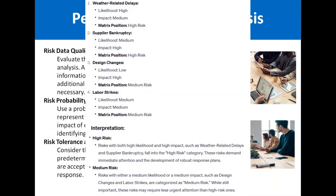A probability and impact matrix is used to visually represent the relationship between the likelihood and impact of each risk. This matrix helps in easily identifying and prioritizing risks. You can think of this matrix as a simple spreadsheet in which the risks are listed along with their probability of occurrence and their impact on the project.